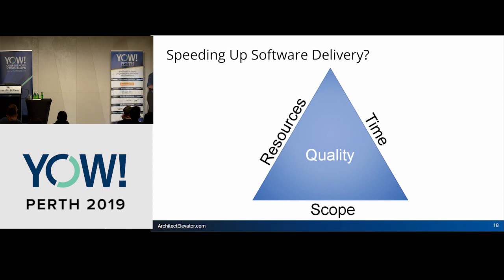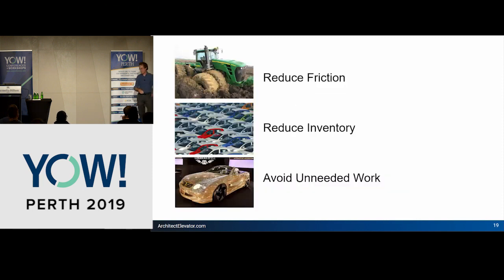On the other hand, it is so widespread. This is where the mythical man month is, give me more resources. We know that doesn't work. However, I still see this every day. People say, oh, we're going to reduce scope, we need more people, maybe we shrink the testing period. So unfortunately, this is as widespread as it's wrong.